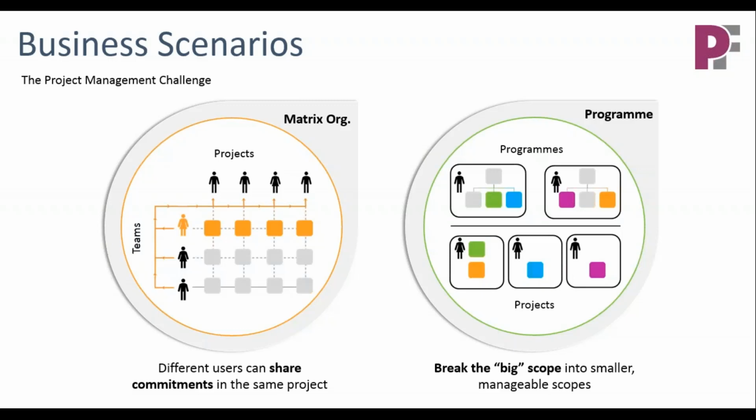This is a challenge, and Project Online does have capabilities built in to deal with these challenges. There's something called deliverables that allows you to externalize products, if you like, that individual projects are going to be producing into lists that other projects can see and can place dependencies on. There are also, of course, capabilities to create direct, say, finish to start connections between tasks across projects.